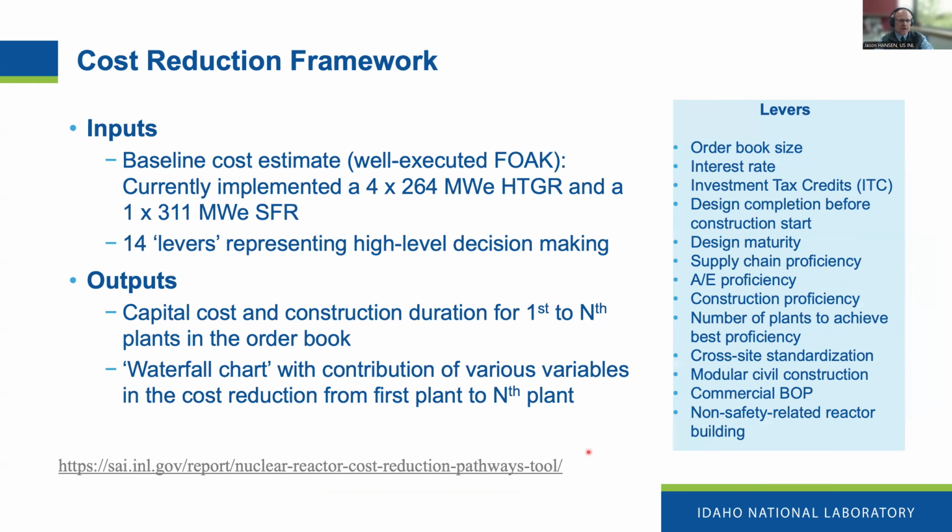Another cost modeling tool is what's referred to as the cost reduction framework. As we go from that first of a kind to that nth of a kind plant, how do things like the amount of orders bear on the cost? How does the interest rate bear on the cost? How does design completion bear on the cost? Many different factors. This is a spreadsheet model available at this link, and it helps you look at the different pathways over which costs could evolve going forward.